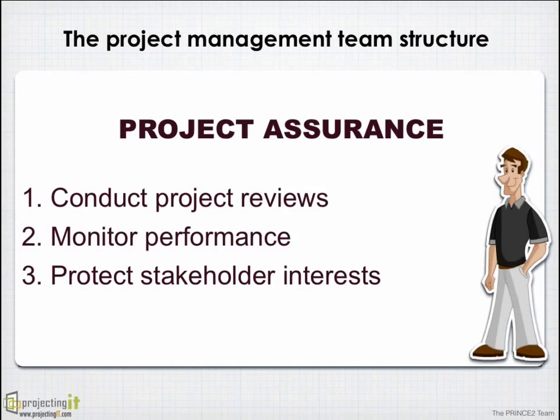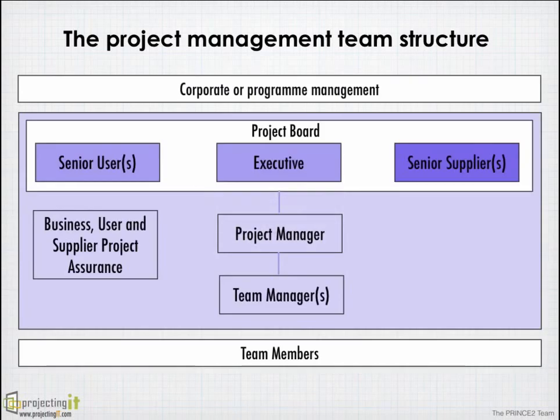In fact, on small projects, the project board, if they have time, can play the role of project assurance themselves. A few people call project assurance whistleblowers or watchdogs. These are experts and they look at how the project finances are being managed, how the project solution is evolving, and whether it will address the real problems raised by the users, and ensure that the project standards and quality requirements are being followed. The project manager should never take up the role of project assurance.